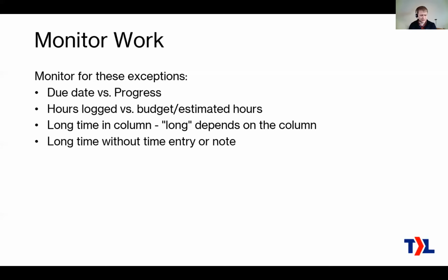You might want to look at a long time without a time entry or a note, because it tells you the truth about whether a technician has forgotten about a ticket or not. If there was a time entry 10 minutes ago, we know that that's in the front of the technician's mind. If there's a time entry 7 days ago, chances are they forgot about it. Okay, so those are good things to keep in mind.